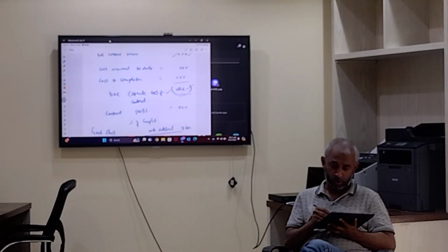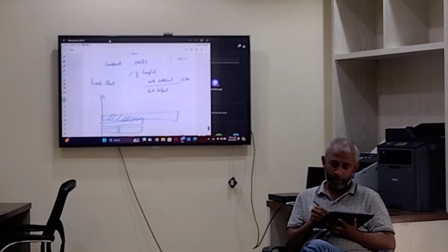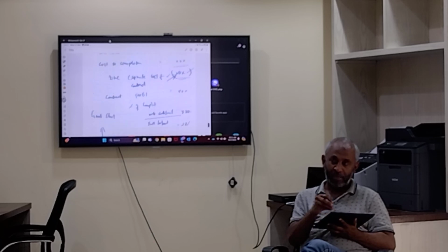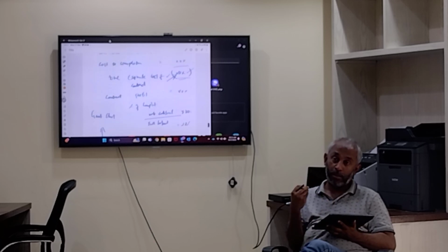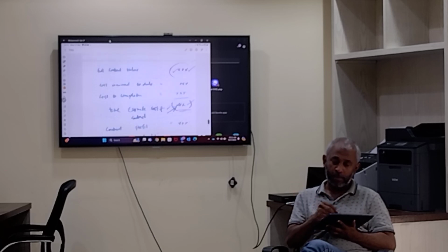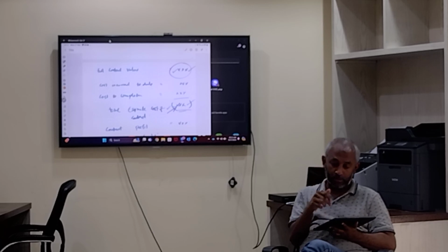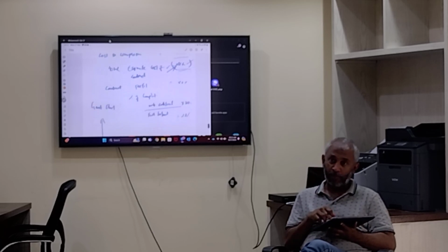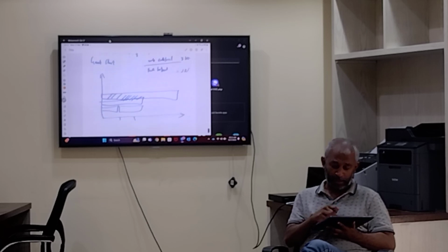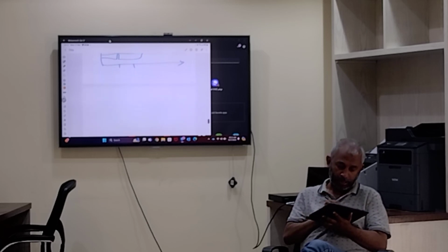So this is the total cost, and this much percentage, like a 28%, for example. So of that 28% will be my cost of contract, and accordingly I can split the actual revenue of whatever we have completed based on the percentage of work complete. Sorry, work certified.